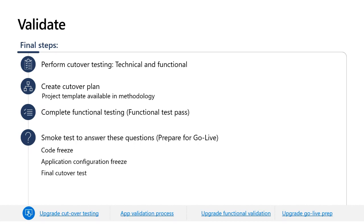Complete a full functional test pass of all business processes. This test pass is an extensive retest of all business processes involving FNO — including both old processes brought forward from AX 2012 and new processes involving features taken up for the first time in FNO. As the go-live date approaches, implement a series of steps to help ensure the source AX 2012 system and upgrade process both remain stable and consistent: implement a code freeze so all code changes in AX 2012 are frozen, and implement an escalation process to handle any critical issues that appear in AX 2012.